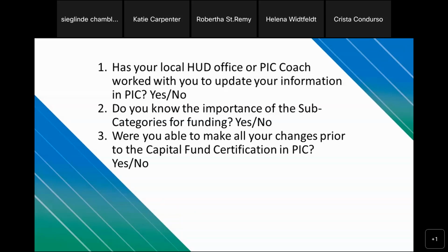For example, right now with all the supply chain issues and delay in supply, as well as having a hard time actually getting contractors and getting your procurement done because there is no availability of contractors, as well as time delay for delivery of materials and services, although some are reporting not having enough employees to meet your time schedule, or it's just outpriced and you have to start new and fresh and rethink your plans.